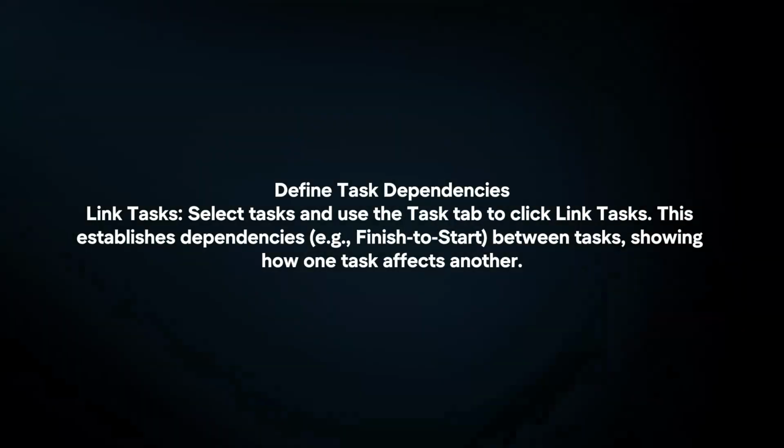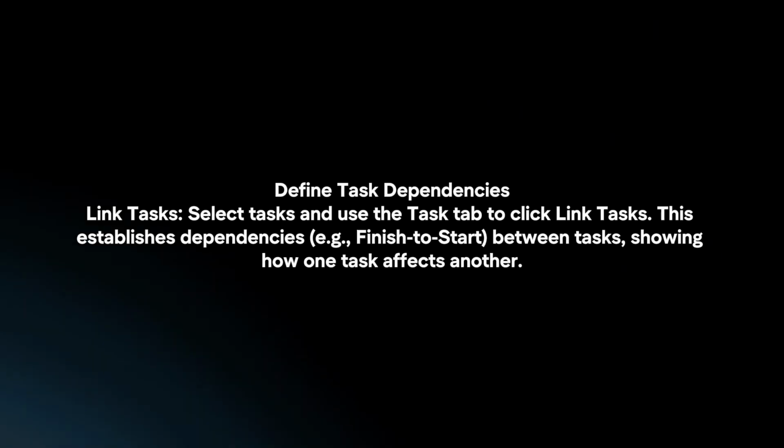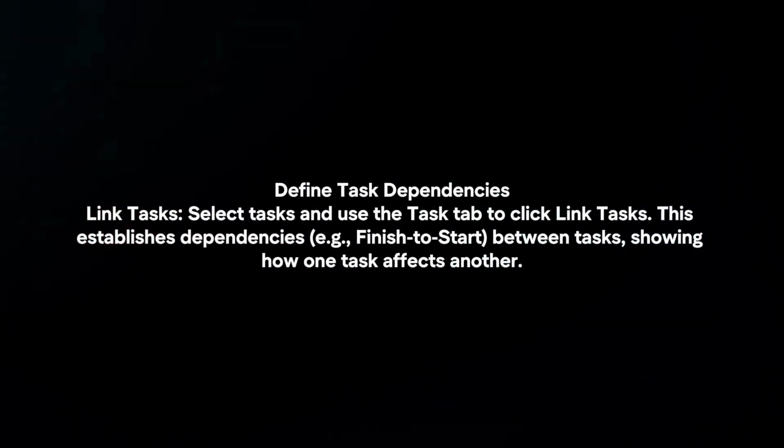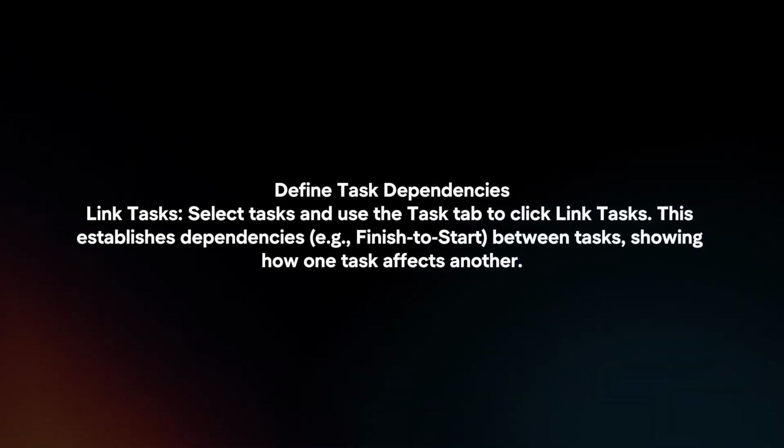Define task dependencies. Link tasks. Select tasks and use the Task tab to click Link Tasks. This establishes dependencies between tasks, showing how one task affects another.